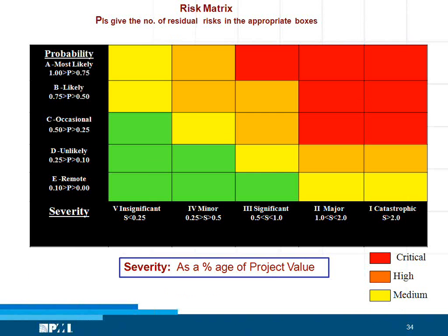It was realized that that kind of a 3-point scale is not so good, it's too broad, so we wanted to redefine it. So generally nowadays people use a 5x5 matrix for classifying risks. I've just put together some probabilities and the consequence factors. That is just a definition. You can keep changing them depending on your organization and the values that you would want.